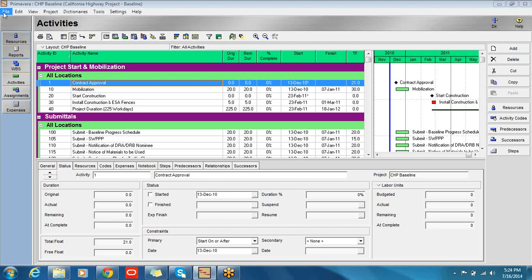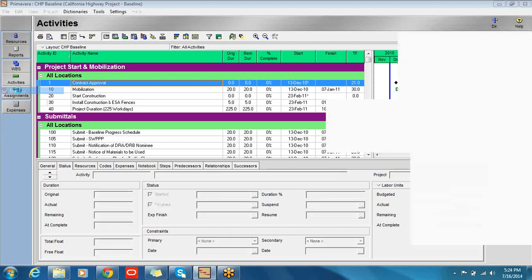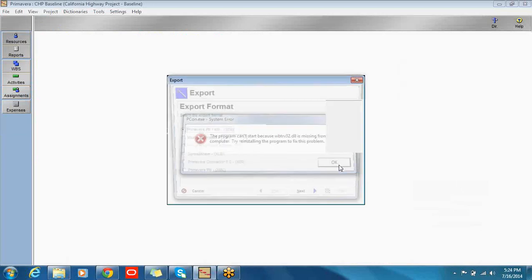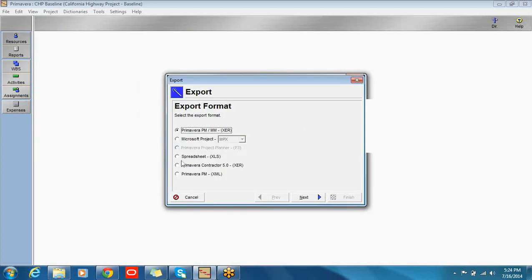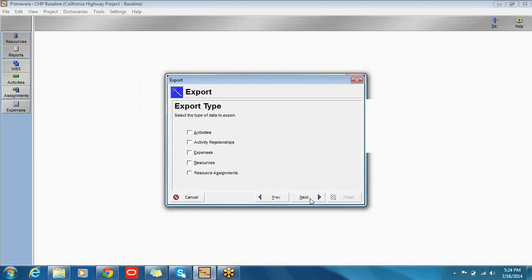Next, we go to File, Export. Ignore that message — we're having a little bit of an issue with our contractor installation. I choose Spreadsheet, go to Next. For a simple update, I only need activities. I'm not going to try to change any relationships. That's a bit more difficult, and I wouldn't advise doing it in Excel until you're very comfortable with the process.